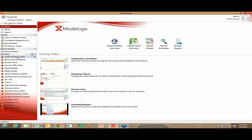Underneath, this would be your unfiltered list of all the projects brought into the backend database. I'll be using a commercial construction example, but from the list of registrants we have commercial GCs, oil and gas folks, and people in the energy field. The type of projects you store in the backend database really doesn't matter — all that matters is you have cost organized by some common work breakdown structure so you can actually analyze the model.